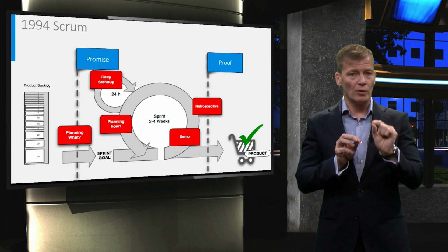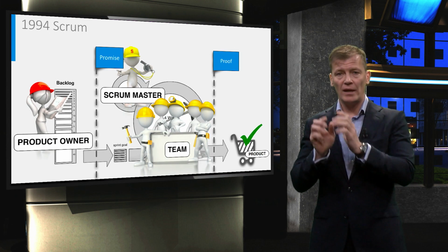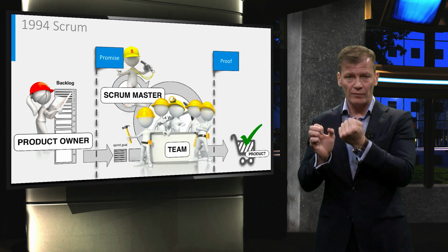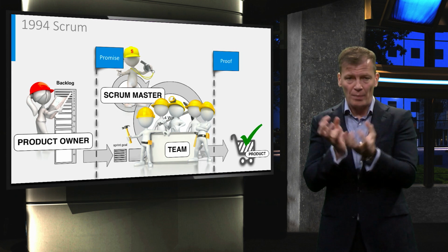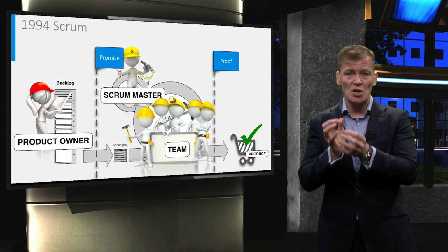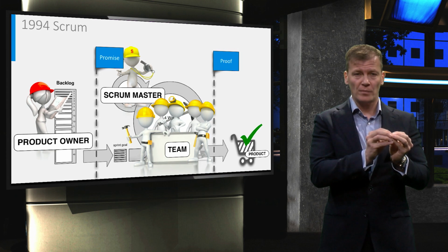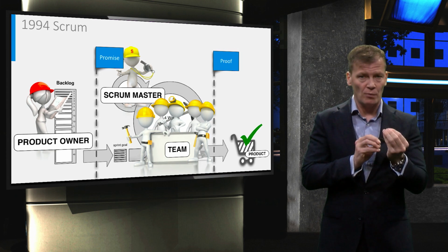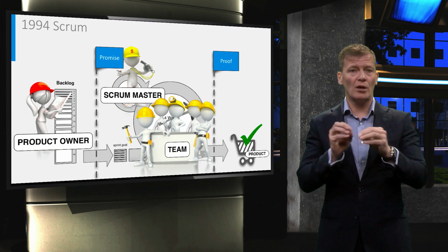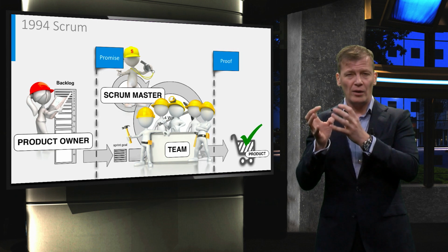There's a number of formal roles and responsibilities to this, but the foundational element is that you say, here's a backlog, a product backlog of things I think I need, pull something out of it in a very lean way, based on your capacity as a multidisciplinary team of testers, developers, analysts, and designers, build me something in 2 weeks that I can see, that you can show me. So I can give you feedback on whether you understand what I need, on whether I still need what I thought I need. These assumptions then all of a sudden become more flexible to reality by learning how to build it and learning what you need.